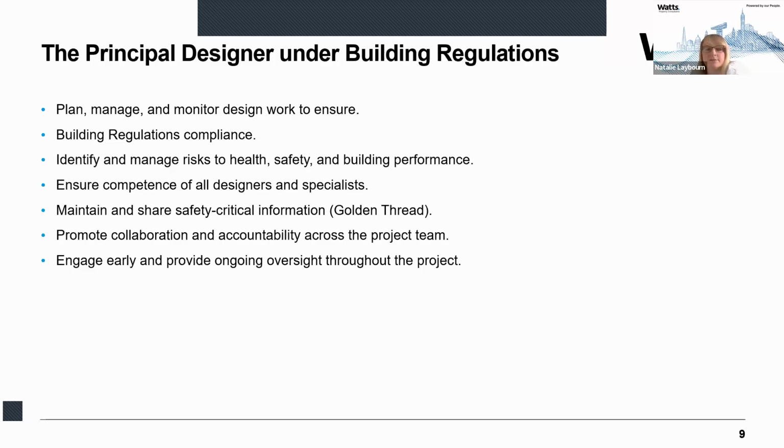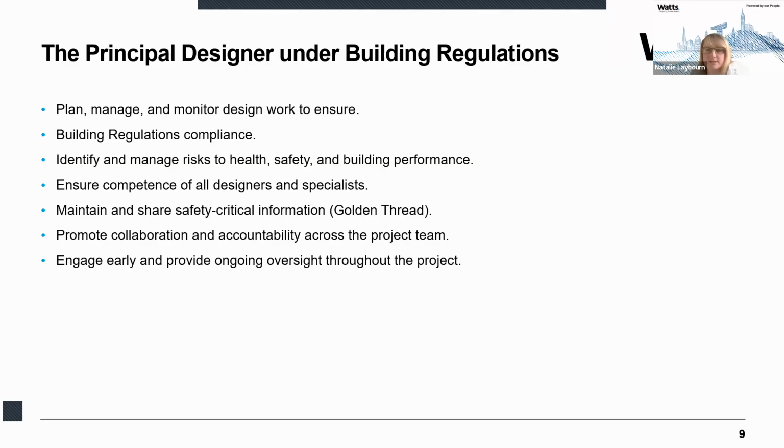In practice, the principal designer is involved from the earliest stages of a project, ideally during the concept or preliminary design phase. It's this early engagement which allows them to influence key design decisions that affect long-term safety, compliance, and maintainability. They also review and coordinate all design work and make sure that any changes or updates to the design do not conflict with the work of other designers or compromise safety, compliance, or building performance. And they hold regular meetings or workshops with the client, designers, and contractor to ensure that everyone's aligned, accountable, and aware of design changes, so risks are managed and decisions remain consistent across the project.